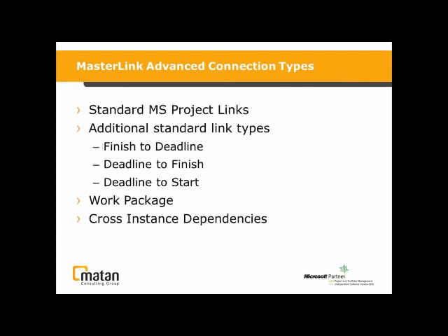When we talk about Masterlink, it gives you a little bit more than you get out of the box with cross-project links. So you also get the standard links that you know of, finish to finish, start to finish, and all those links. But it also gives you other links that for some organizations are really important. Links like finish to deadline, deadline to finish, deadline to start, and work packages, which is a really important connection type for us and for program managers in general.